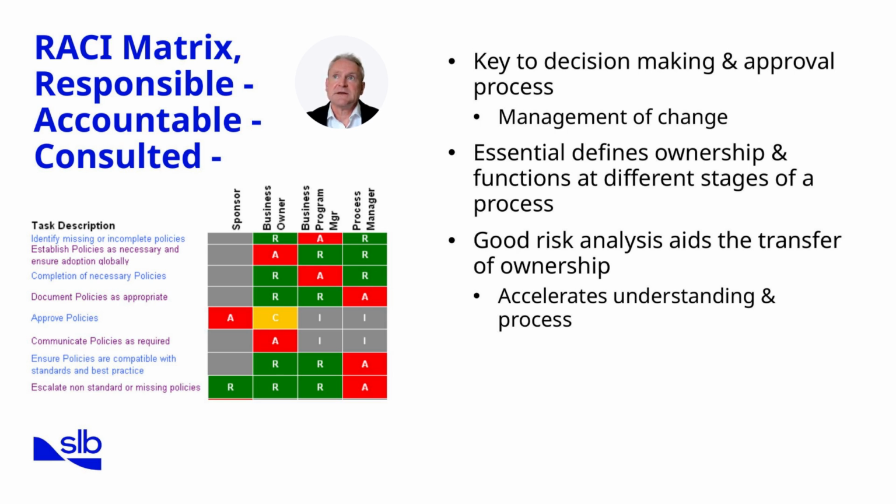Consulted refers to subject matter experts or stakeholders whose advice is required before a decision is finalized, such as geomechanics specialists or safety engineers. Finally, informed includes those who must be kept aware of decisions but are not actively part of the process, such as operations, management, or partners. This matrix is vital in managing change. It avoids confusion about who owns each decision and ensures risk responsibilities are not overlooked.